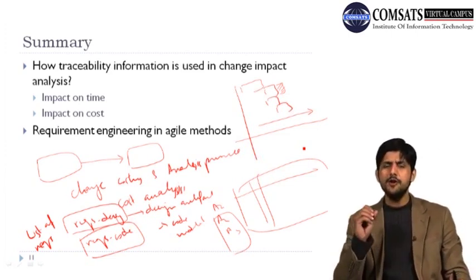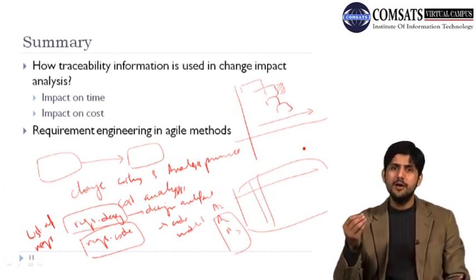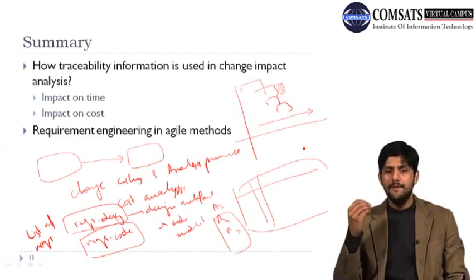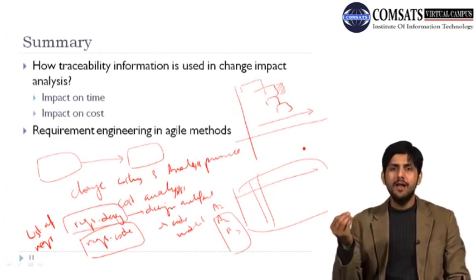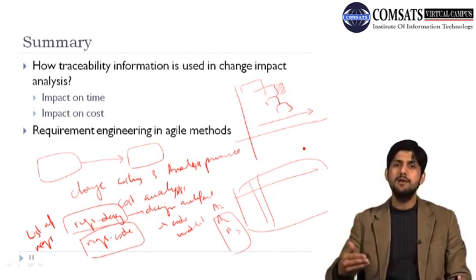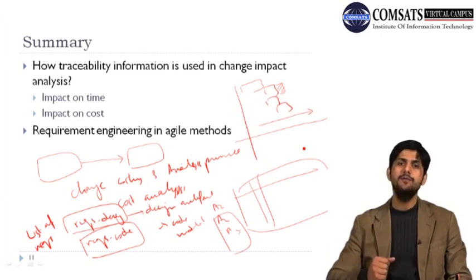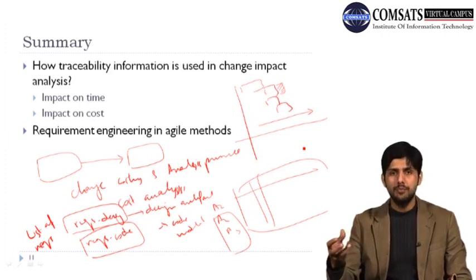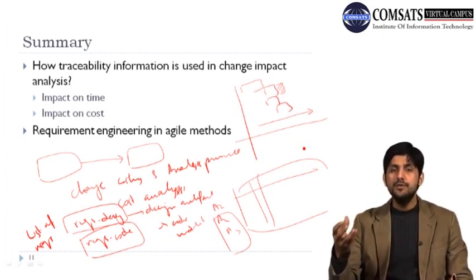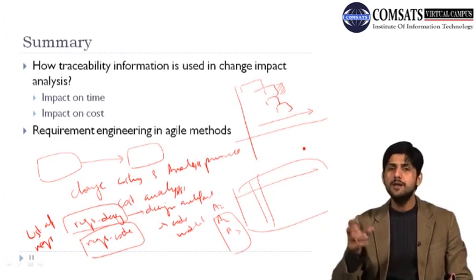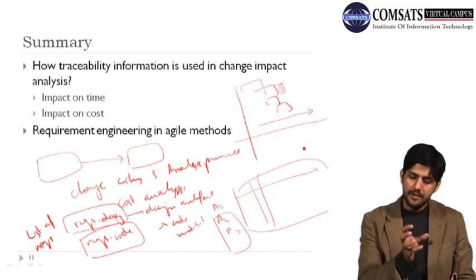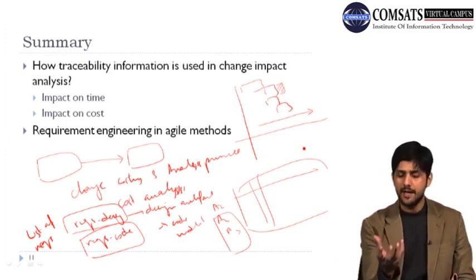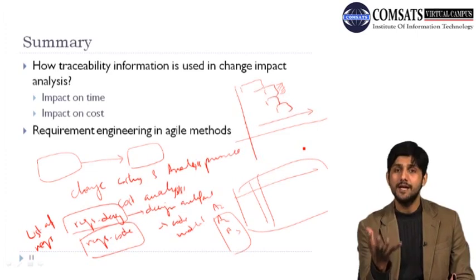Then there are a couple of other concepts that we talked about, rework strategy, and we said that for any organization, these values come from experience. So through your knowledge of doing multiple projects within the same organization and working on similar kinds of projects, you can decide what rework strategy you are going to deploy. So you would know by experience that depending on a particular change request, how much rework would be done in a particular activity. But the important thing is to realize that this traceability information is very helpful.